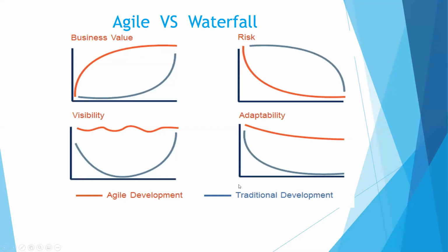Every time, the Scrum Master needs to be updating this chart to keep to the agile principle of transparency, so everybody will know where this team is. In 2 weeks they committed to 20 stories. After 1 week, they are still on number 18. Everybody will know that this team may not deliver, or they have a problem. So the risk is actually seen quicker. So the Scrum Master is going to be updating the charts, which is more of updating the progress.